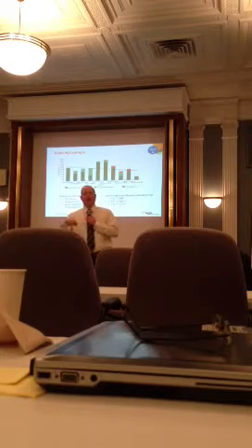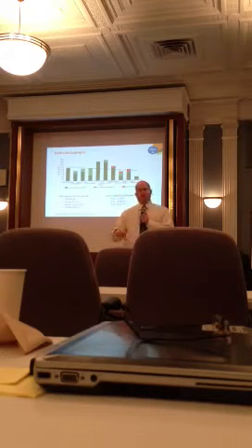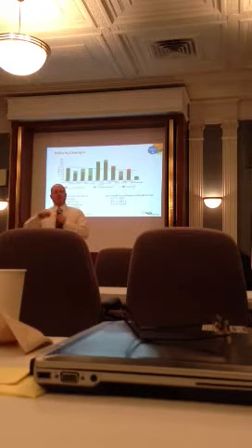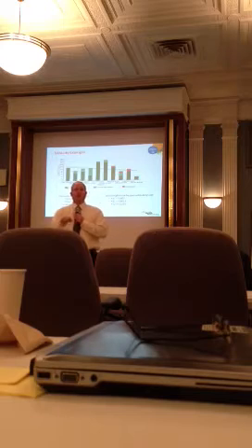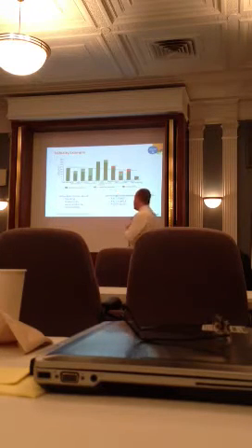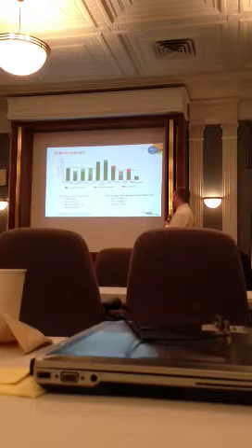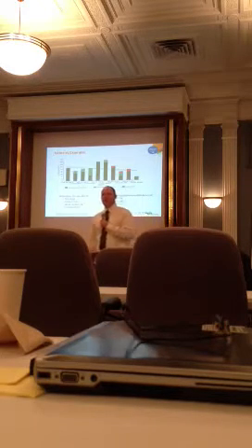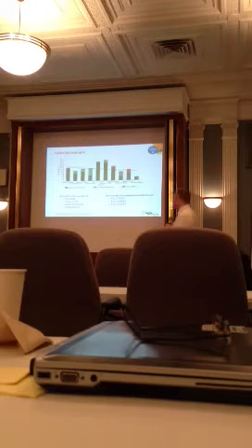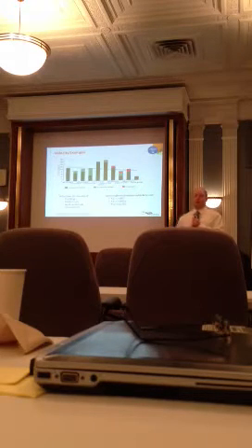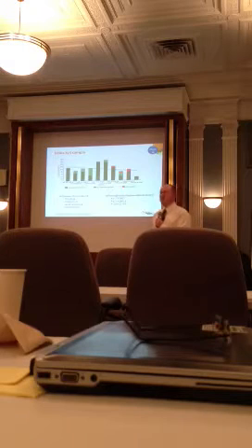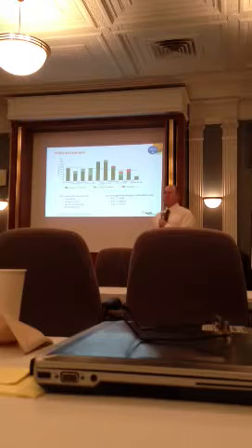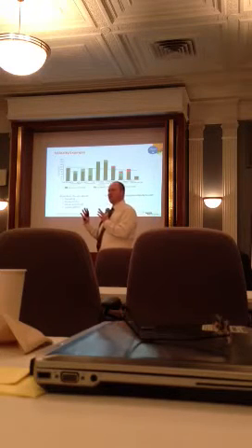Okay? The red on the graph is indicative of a user story that you committed to in that iteration, and as of the time that I pulled this chart, this metric, it still was not accepted. Okay? And I pulled this on, essentially, I know it ends on December 30th. I pulled it on January 3rd when I got back from work and I hadn't updated or changed anything. So you can see that there is still red all the way back a couple of months prior. So those user stories still had not been accepted. Okay? And this line here is just a trend line, trending down. So does everybody understand the graph itself?